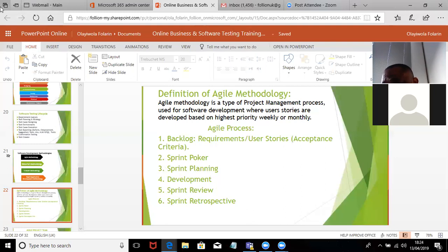Yes. Plus or minus, they shouldn't be more than 7. And the sprint planning, their sprint is usually every 2 weeks. At the end of the sprint, they will do a sprint review and a retrospective: what happened, what could have been done better, and they will discuss what has been done.